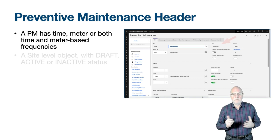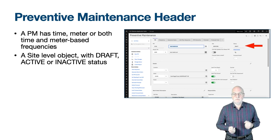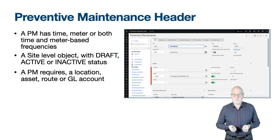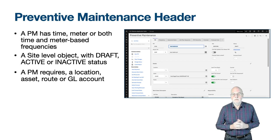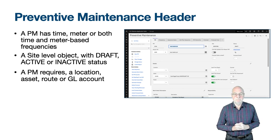PMs exist at the site level as they are generating site-level work order records. A PM has a simple set of statuses: draft, active, or inactive, and PMs need to be in active state to generate work orders. A PM must reference either a location, asset, a route, or a general ledger account — something to charge the work order to. Without either of these you will receive error message BMXAA3204E: an asset, location, route, or general ledger account must be associated with the PM.